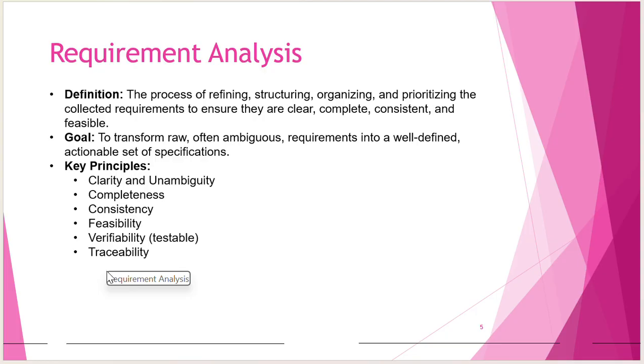Once you are done with your requirement gathering, you should analyze that requirement to prepare the FSD document, the business requirement document, the wireframes prototype, and the change request document. So in that process, you should do the refinement, structuring, organizing, and prioritizing of your requirements. You should put at the top of the priority the requirements with the highest urgency, highest importance, or regulatory requirements that have an immediate deadline. So those are the requirements we should prioritize and sort.